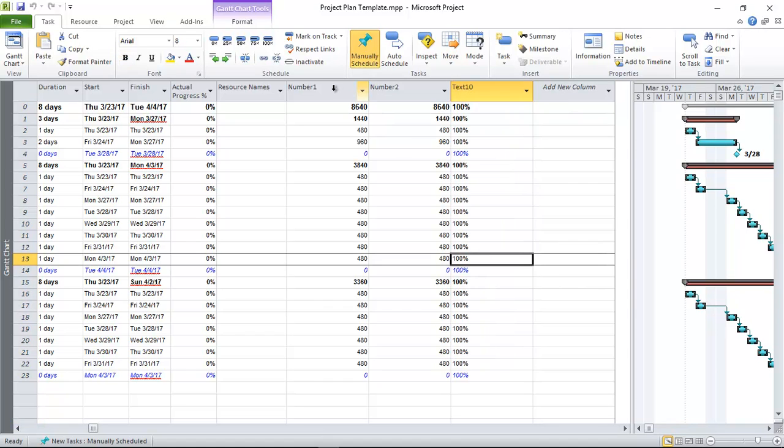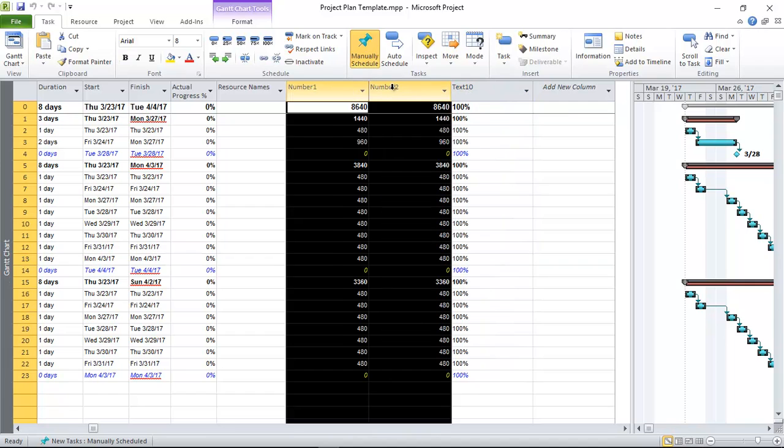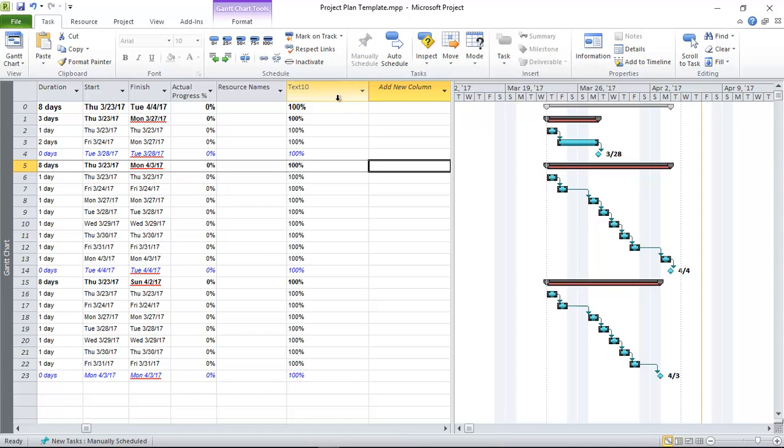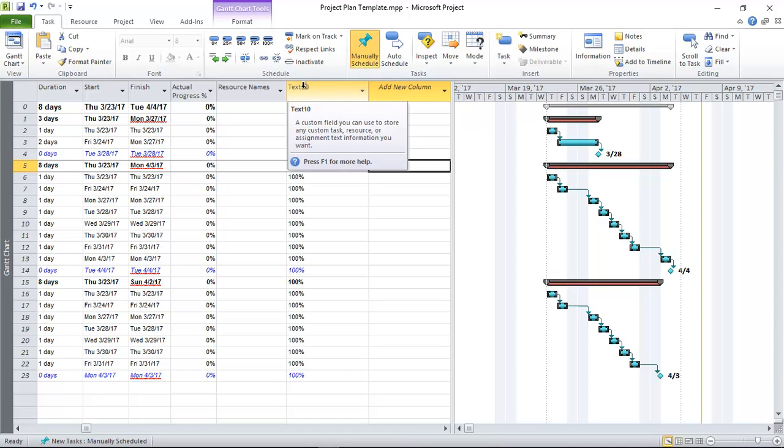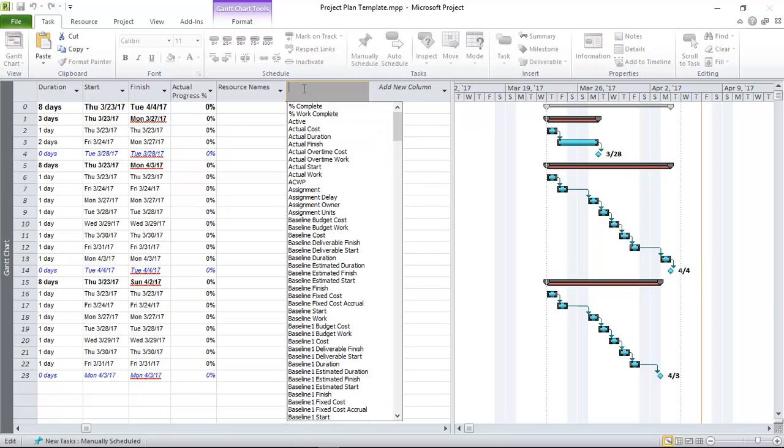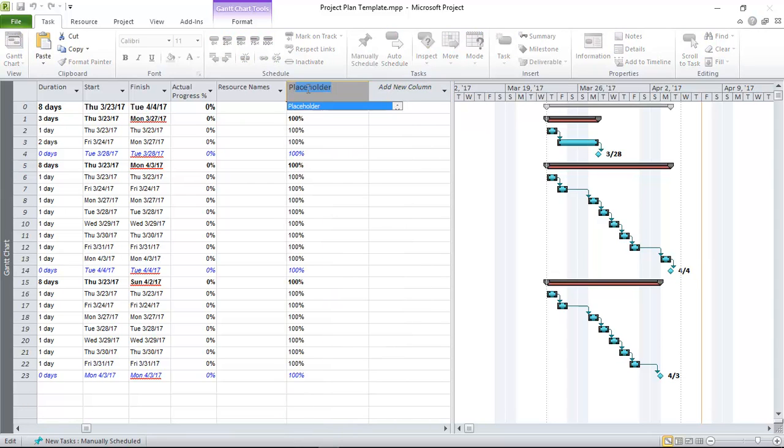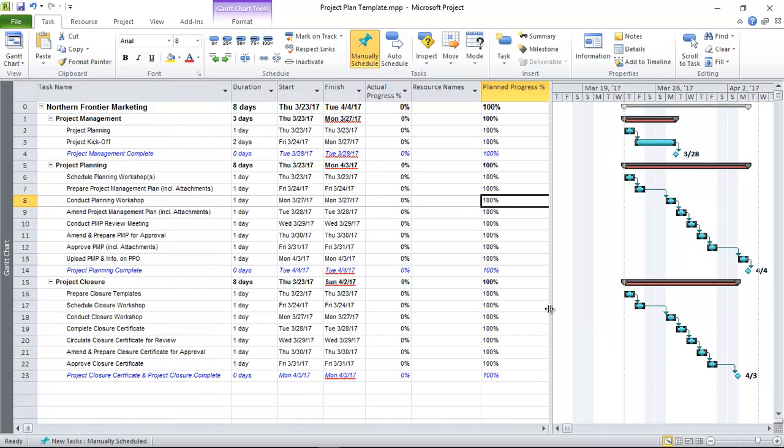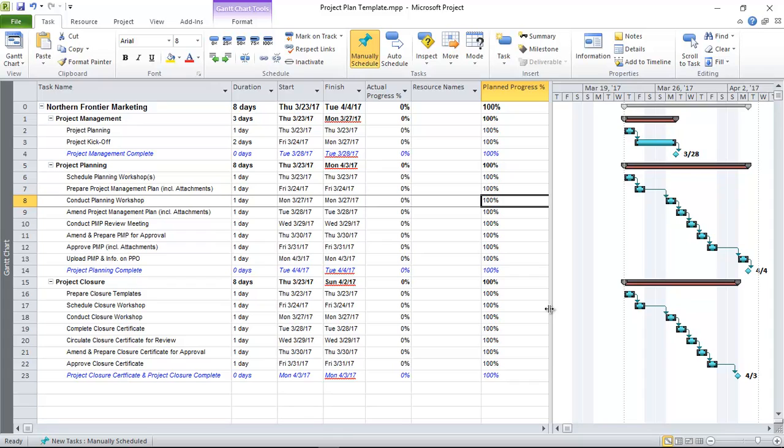Last step you would now do is hide these two columns and then rename this column. I'm going to call it planned progress percentage. So now that that planned progress percentage is implemented in your schedule, whatever that value is when you import the schedule into PPO, the correct planned progress and of course the correct actual progress will then reflect in PPO.